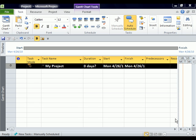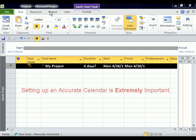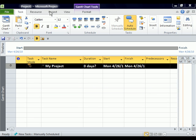One of the other most important things that you can do to make sure that Project is tracking your schedule effectively is to make sure that your company calendar is set up. One thing that I really always try and show people in these classes is that making sure that your calendar is matching up with reality is the most important thing that you can do. Otherwise, Project is tracking days that could be holidays or non-working time. I also like to remind people that this is not your own personal resource calendar. There are options for individual resource calendars that you can use. This is for the project. When is the organization not working and so forth?